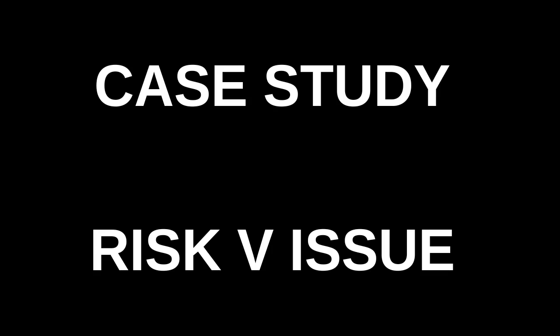In this software development project, a risk might be the potential for a security vulnerability in the code, while an issue could be a critical bug found in your current build. The risk requires a mitigation plan like regular code reviews, whereas the issue demands immediate troubleshooting and fixing.